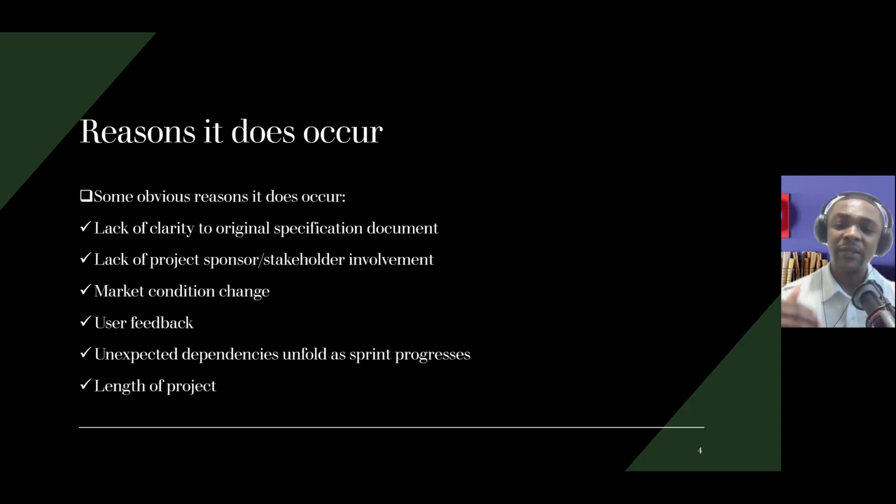So that is why Scrum recommends that during the sprint review, those project sponsors could be invited. They are encouraged to attend the ceremony so that it will help us to capture feedback and know when we are really getting off rail, in such a way that the team members can know how to factor those changes as they come.